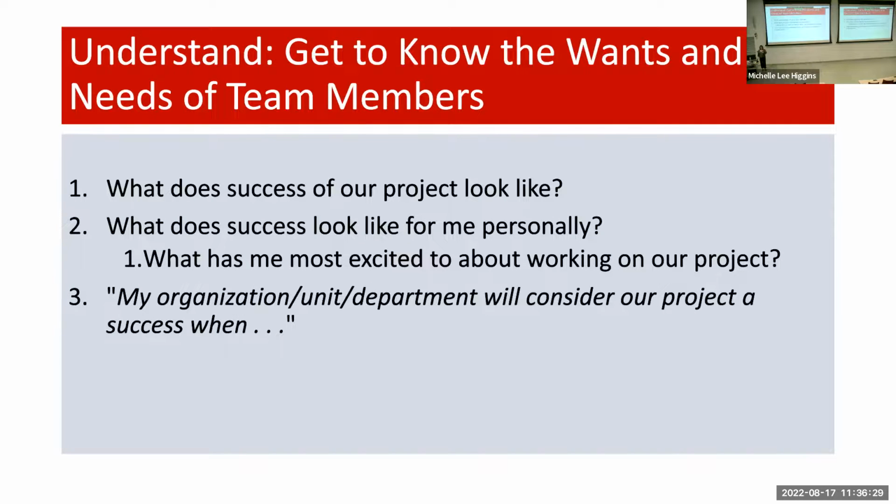So, circling back, here are some questions that I really like to be very explicit about. What does success for the project look like? I've worked with teams who had a funded project. This was a kickoff meeting for them. They realized that they all had different ideas of success and didn't capture one of the goals in their proposal. They made a group decision to put that in. What has me most excited to work on this project? Why am I here? Why am I invested? And then what about my organization? So being explicit about those.